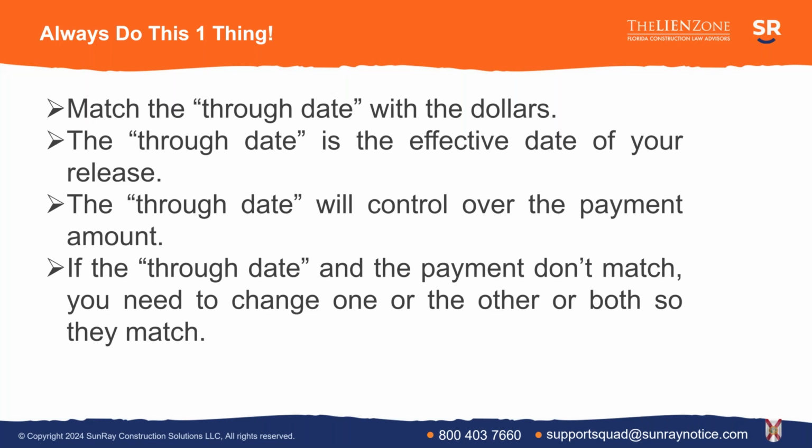And if we went to court and you said, well, I was expecting 10, they only gave me 6, and the release says $10, I would argue on the other side, and the judge would likely agree, well, you said 10 and you showed up and you got a check for 6,000. Well, 6,000 is more than 10. Don't tell me that you were expecting 10 because it doesn't say that anywhere in the document.